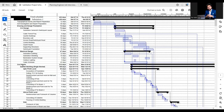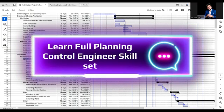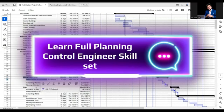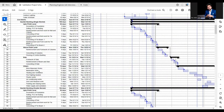Next we have civil works — this is where the construction work starts. Quarter building, single storied: you can see activities up to plinth level. I'm talking about our scope baseline, how to compile it. Civil discipline is the major one here. Excavation of foundation, soiling, PCC for footing — all these activities are a set of small actions which complete the quarter building up to plinth level, then above plinth level, then slab, and further others.